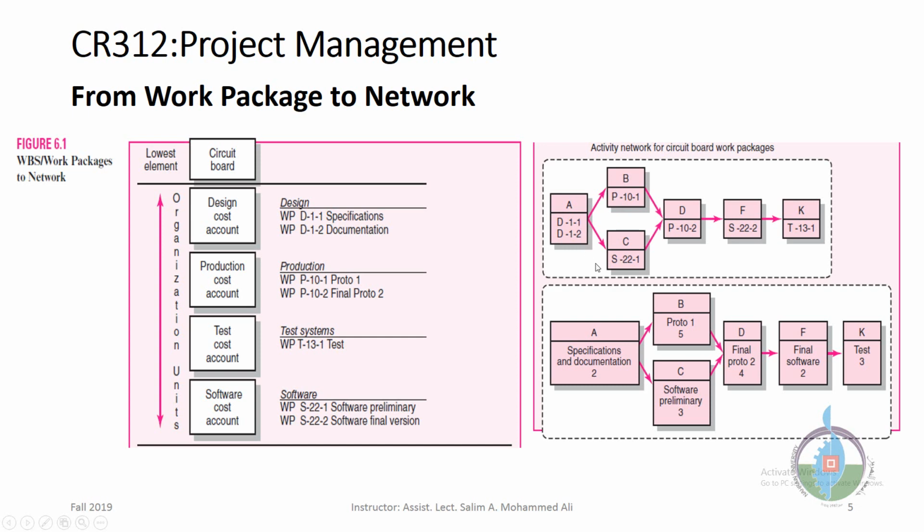This is important. A project manager should avoid multiple concurrent parallel activities. For example, if we have D and F as parallel activities like B and C, there will be some confusion. We should have single parallel activities, maybe 3 of them. It's possible, but multiple concurrent parallel activities are not recommended.